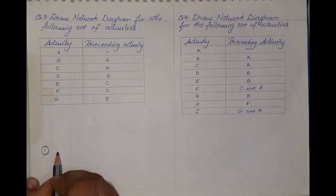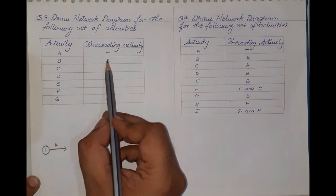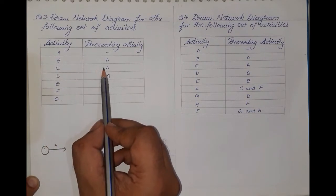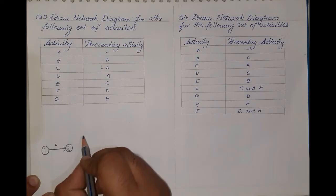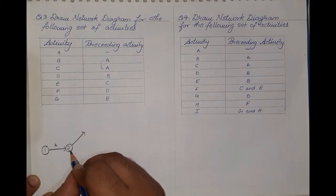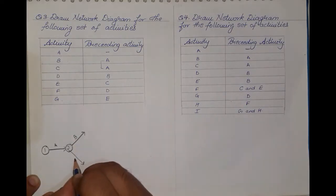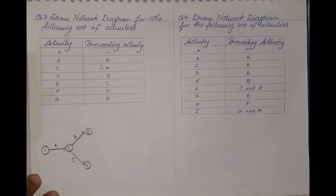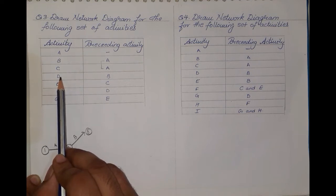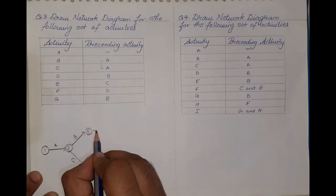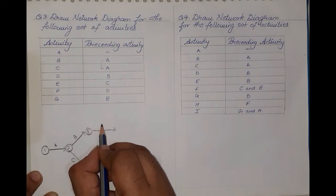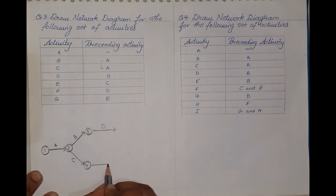Activity A has no preceding activity. Next, activity B has preceding activity A, and activity C also has preceding activity A. This means from A, two activities have evolved — from A we have activity B and activity C getting evolved. We note down B and C: this is the end point of B and this is the end point of C. From B, activity D has evolved, and from activity C, activity E has evolved.